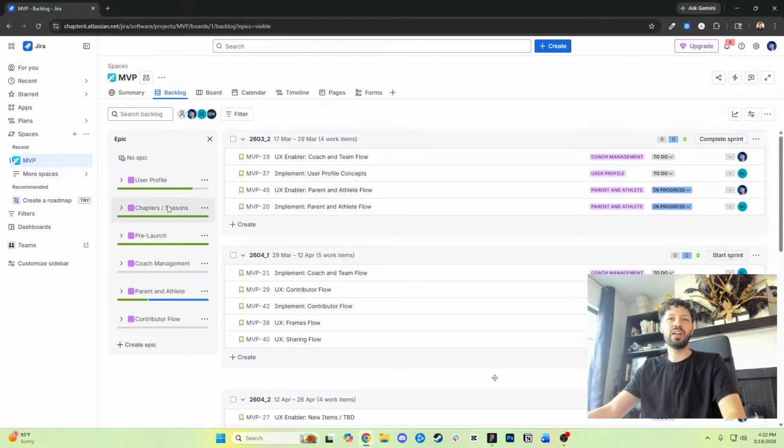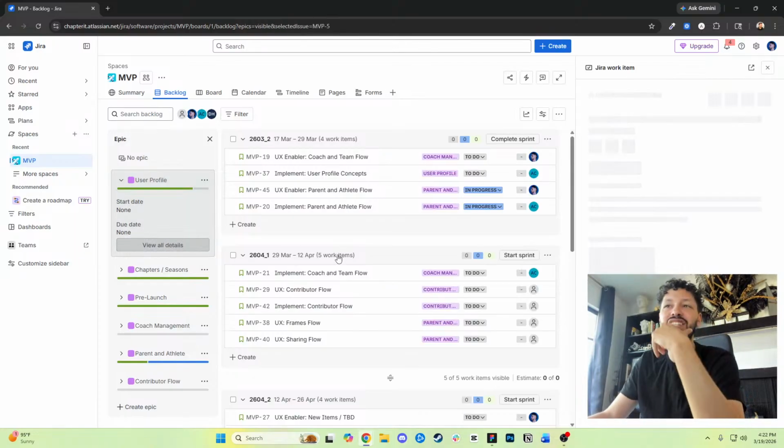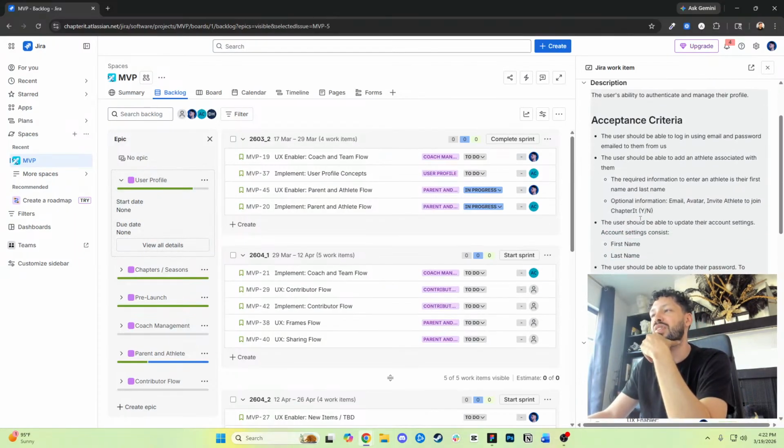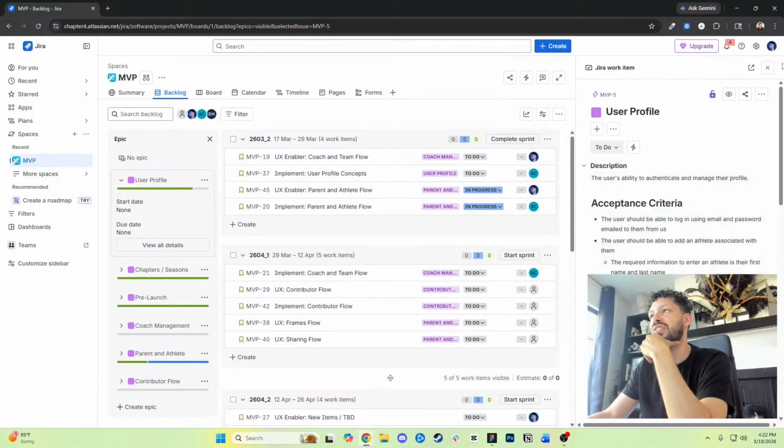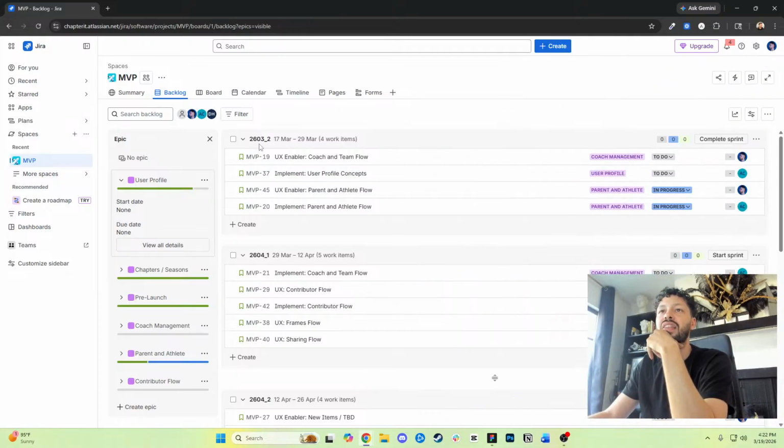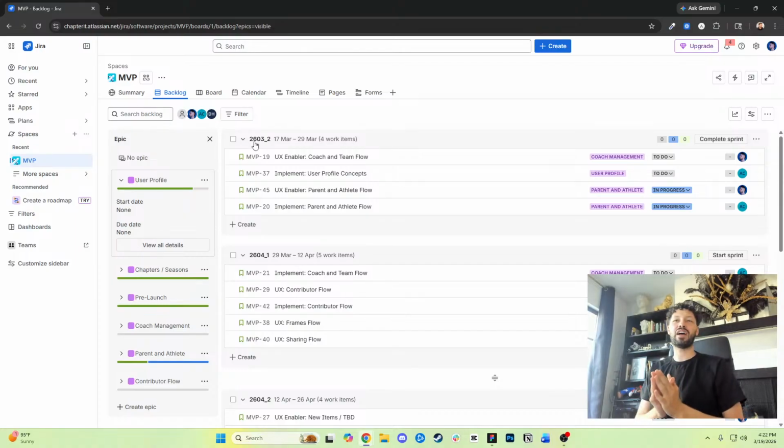I do put a lot of the stuff in. Let's see, do I have any of these? I hate filling these things out, but yeah, I did fill some stuff out here, as you can see, and then I created the sprints. I do this technique with sprints. I learned this from another company where they have the year, the month, and then first and second, right? So if it's two week sprints, two of them is a month.